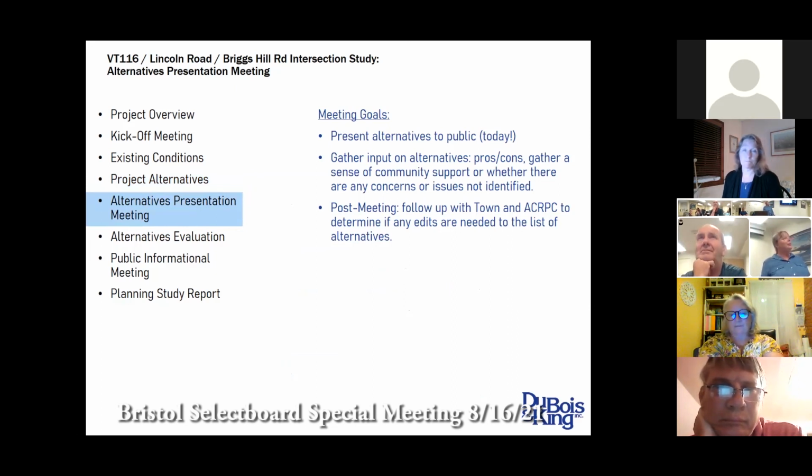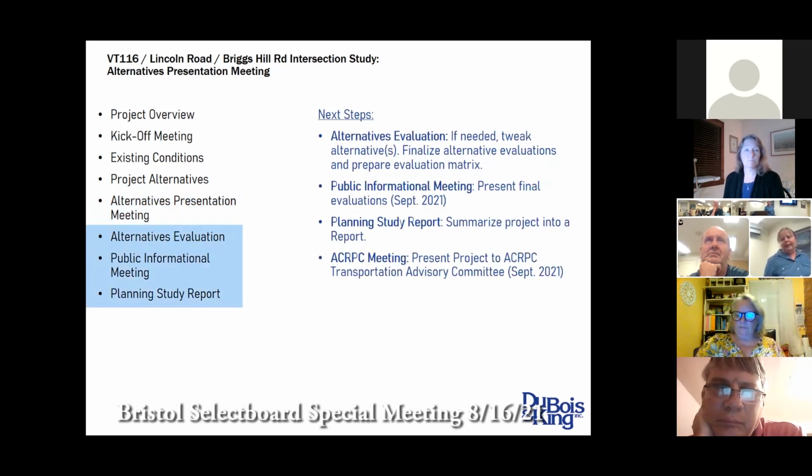So the alternatives presentation meeting, that's what we're doing tonight. The purpose is to gather input on alternatives, talk about the pros and cons, talk about supports. We've got some good input on that. Then we'll follow up with the town and the RPC to finalize tweaking the list. Next steps will be taking alternative evaluations a little bit further. We have a lot of this work done already, but there are some environmental things that we're checking into, basically coming up with an alternative evaluation matrix to put into the scoping report that summarizes the impacts and the cost of all the alternatives.